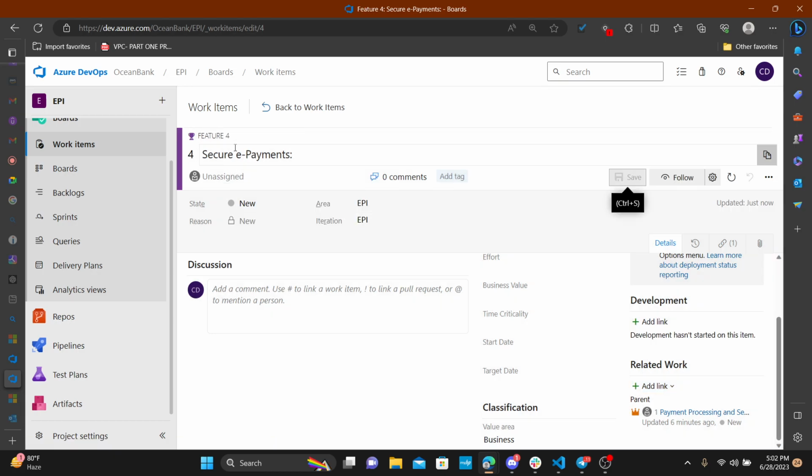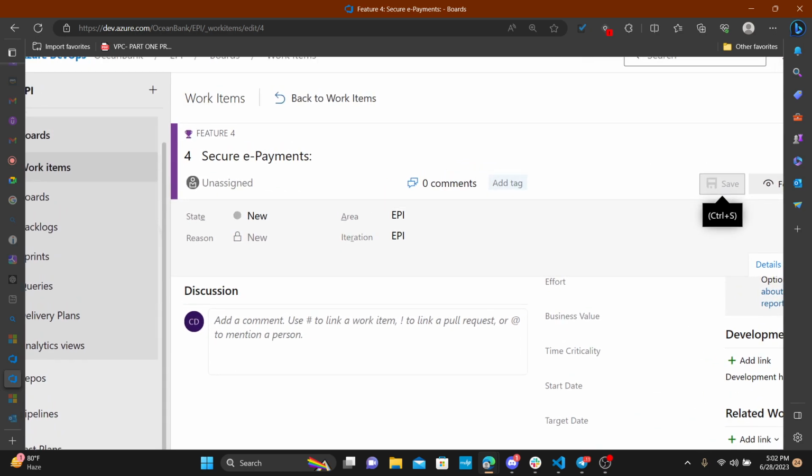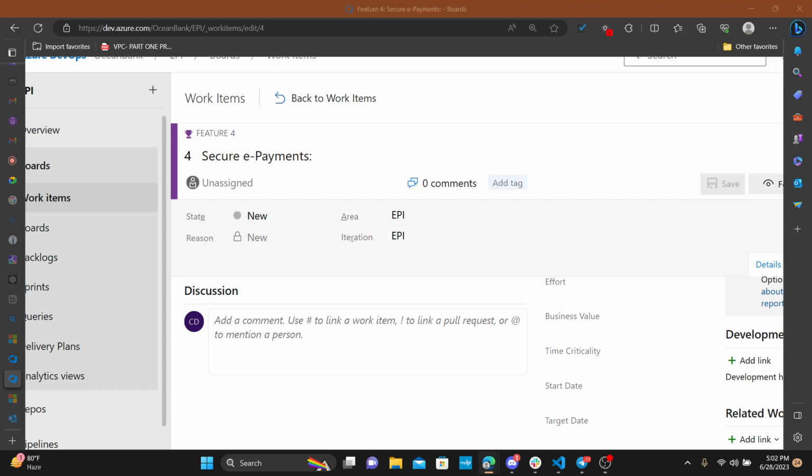This is very important, guys, because as you work with your team members, your project, your vendors, you really want to organize the work. Features are tied to parents, which are epics, and user stories are tied to features because user stories are children to features.